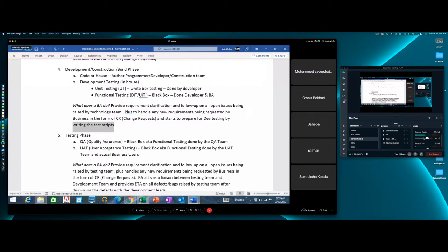All right. So, Oye, when I ask you how the testing is going, you should actually be sending me a weekly report on the DIT saying, Ali, these modules have been tested. This is the percentage tested. This is the number of issues we have found. How many issues have already been resolved? These are still pending, because that is how I know whether we are ready to go to QA or not. You got it? Got it.